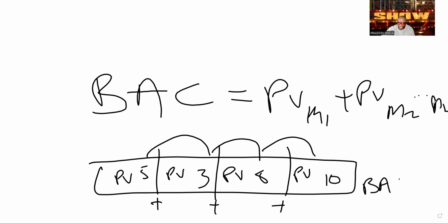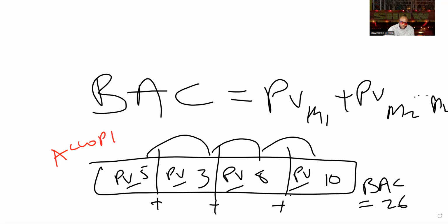So the budget at completion is the total amount that you're looking to spend for the whole project. Planned value is the amount you're looking to spend for a particular time phase. And earned value is what you did, right? Accomplishment. So what you accomplished, let's say we're looking at month 1 and you only got 2.5 done instead of 5.